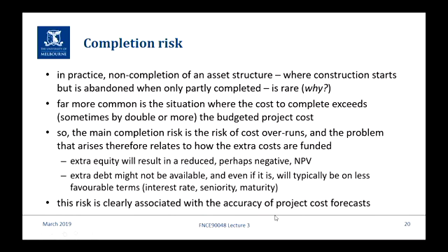So the risk is associated with the accuracy of your project cost forecast. If you get your forecast right, then you raise the right amount of money. Be conservative. But it's a balancing act, because if you're too conservative, it costs too much, you might not get your rate of return. It might not be positive NPV.